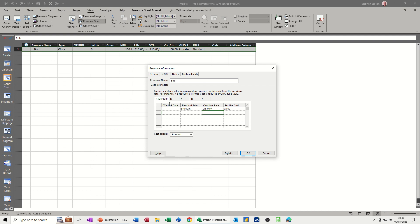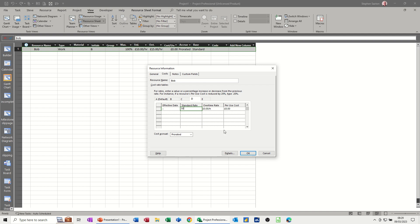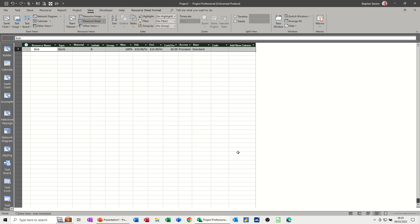So default is normal rate of pay. And B could be corporate. C, that's a fixed cost. And let's do overseas for D. So on D, let's say you're going to get paid £50 standard rate per hour and £60 overtime. So that's quite good money. And then click OK to that.